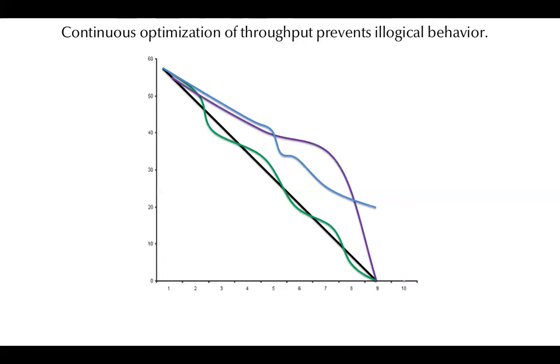Now, we might have a curve that looks more like this purple curve where you have a team in a very similar situation, but instead of panicking and trying to work harder, they look for the bottleneck. They look, what is the constraint in delivery that's biting us? And it could be just our team sizes are too big. It could be we've got some upstream team that have responsibilities for doing things and they don't talk to us. It could be that we have manual testing going on and we need to automate our testing because we have to be able to refactor as we go.